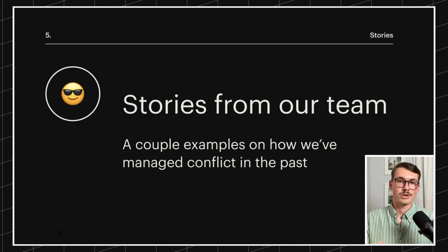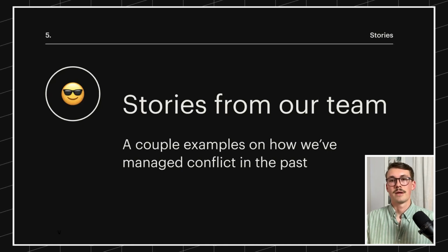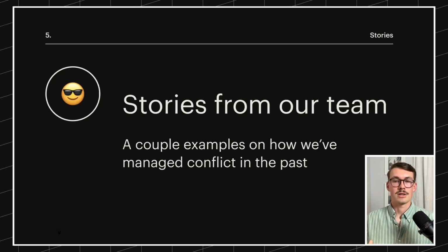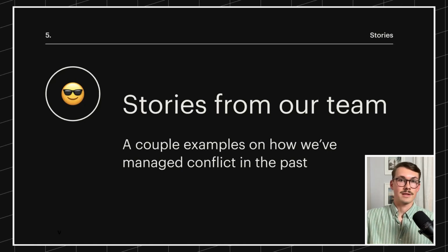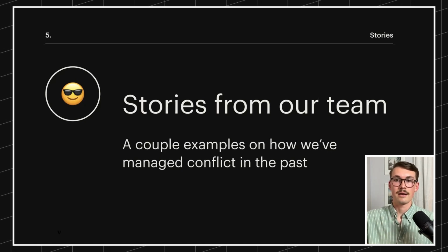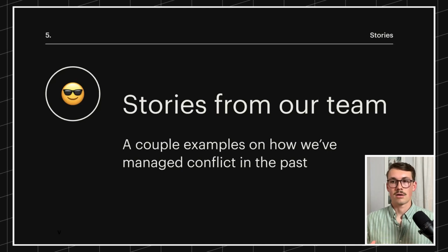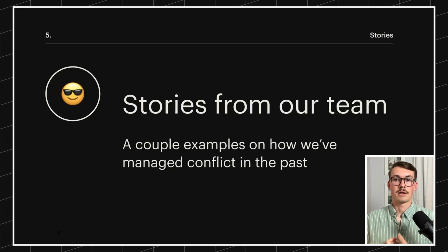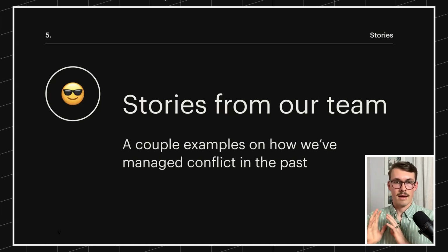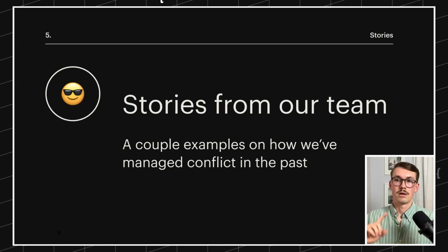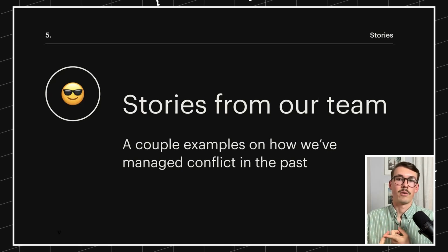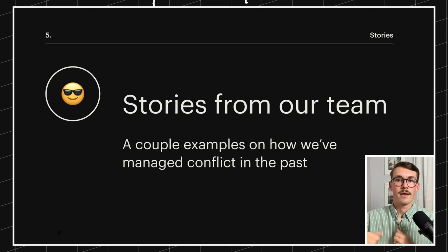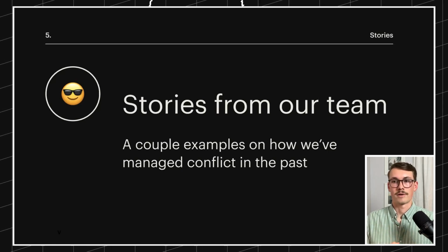This is the solution that Maggie put in place. So the first is we started clear communication between the client and our team by establishing a designated point of contact on both sides, on our side and the client side, to ensure that no miscommunication occurred. One of the big issues early on that they brought to us was miscommunication. So we said, okay, we'll take that fact and we will deliver a solution. Here are the designated people on both sides, our team as well as the client, that need to be the main point of contact.